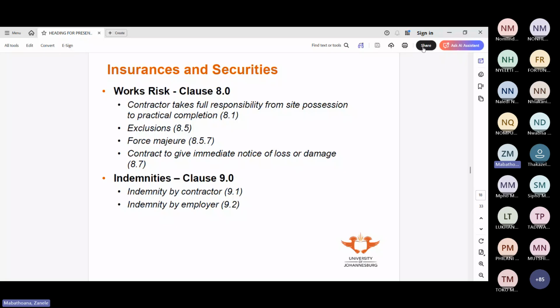So the side instruction is just to tell the contractor what to do in a circumstance where there's uncertainty or there's a clash. It may not have a cost implication or a time implication, right? It becomes a variation if it impacts either the cost or the time or both. Then it has to be reported as a variation to whatever was agreed. So not all side instructions will lead to a variation, but at times a side instruction will lead to a variation.